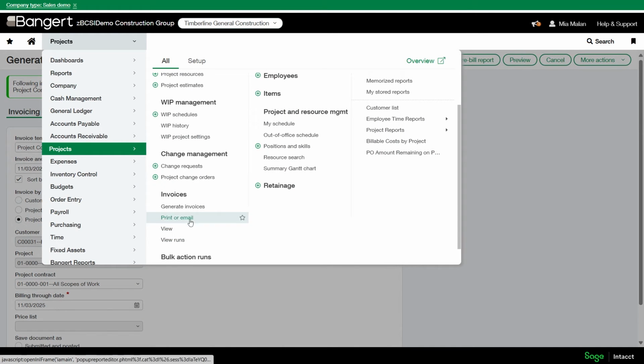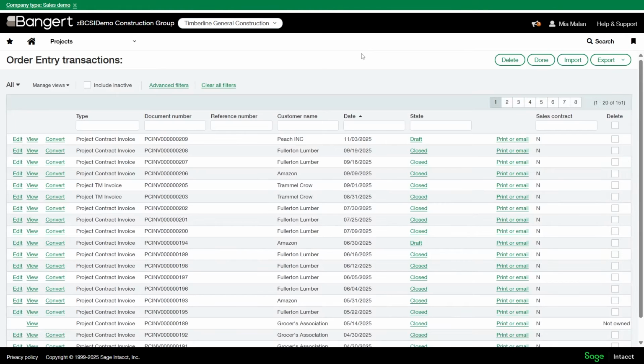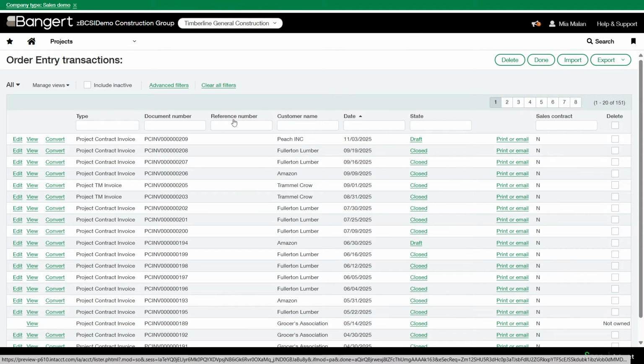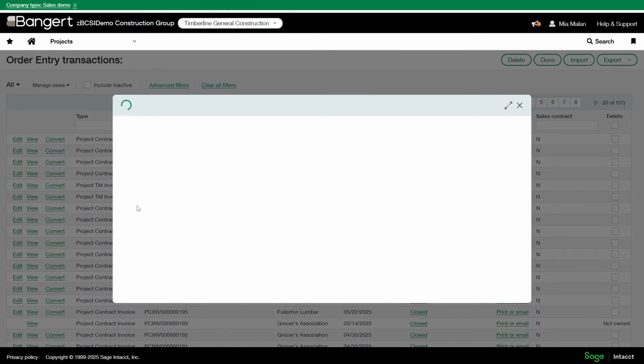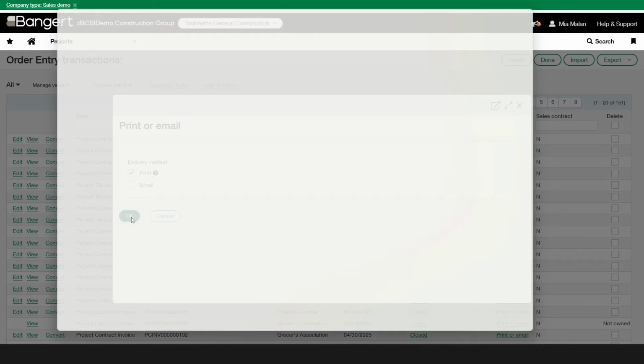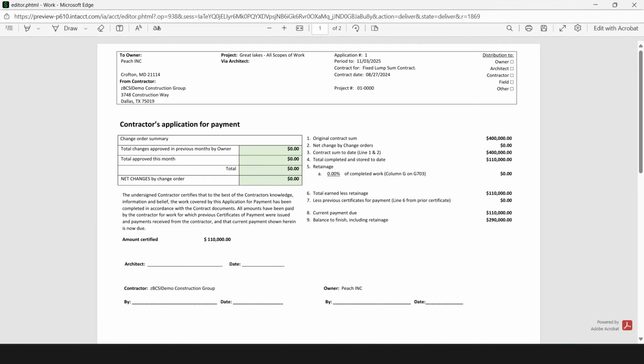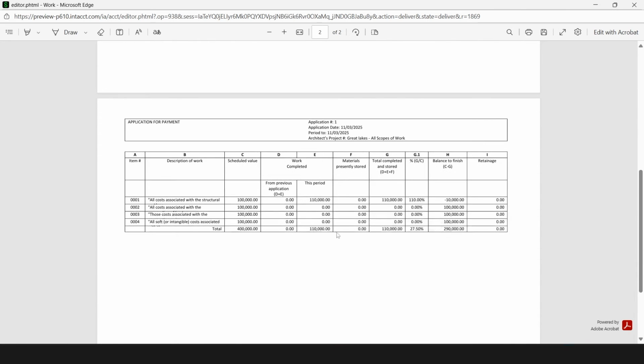Let's view our invoices under Invoices View. So previously, if the progress bill line was set to total revised price, I wouldn't have been able to overbill that line. But because I put no max in, I can now bill over. And your invoice form might look different. But we now have this option to overbill the line.